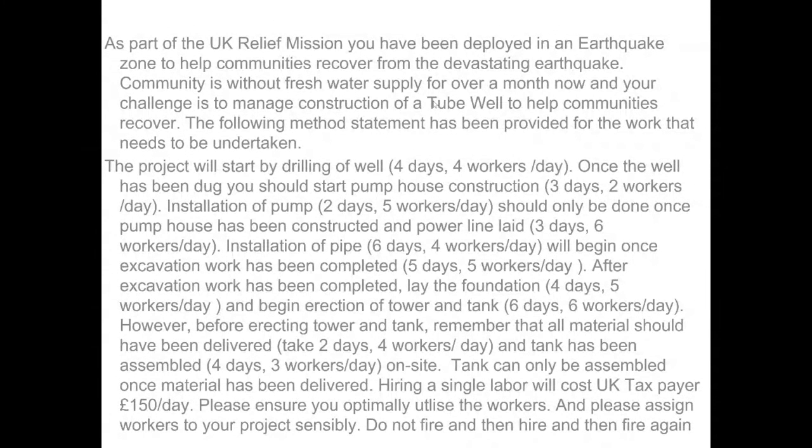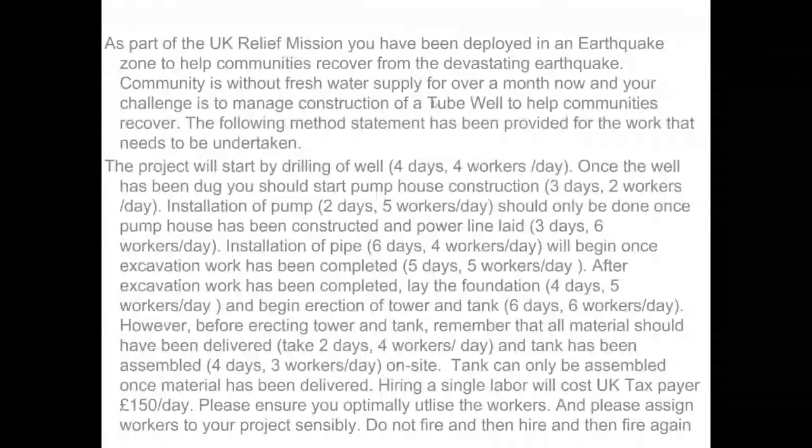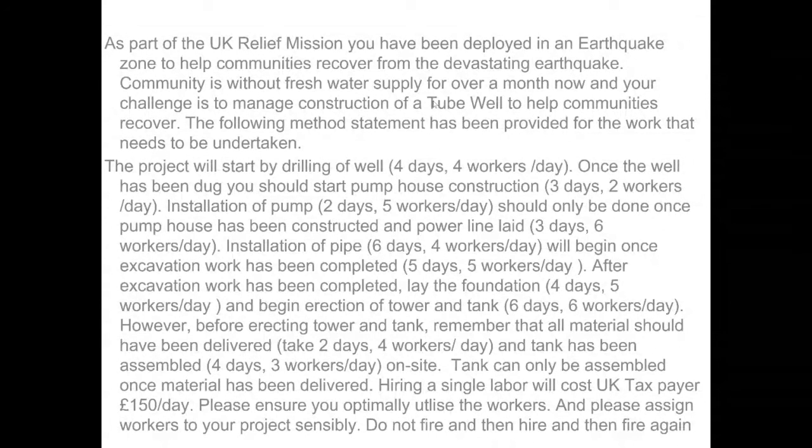So the sponsors don't like you hiring and firing people, so you have got 15 laborers working for you one day, and next day you decide to just work with 8. That is something which the sponsors will not look at positively, because what are the 7 workers going to do sitting idly? So your challenge would be to keep your workforce busy using a smooth resource profile, right?